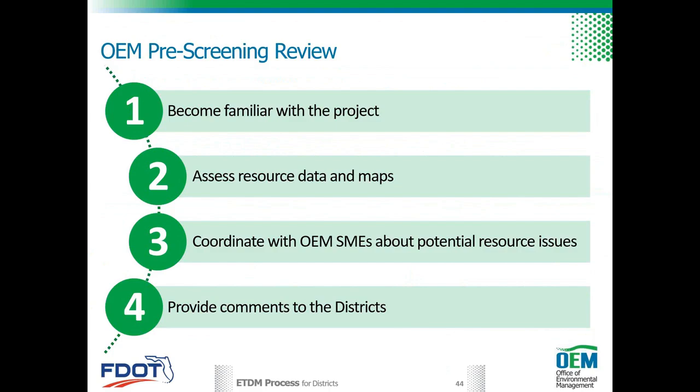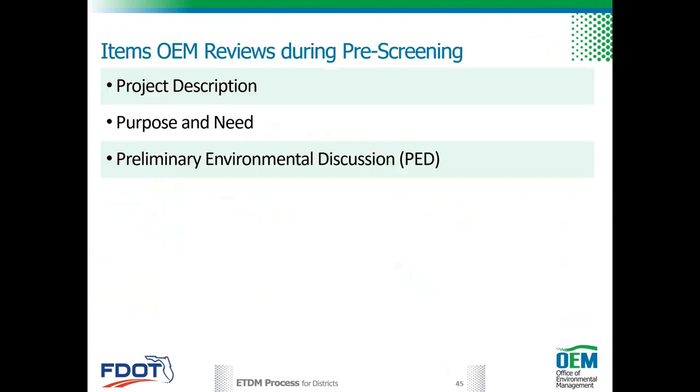OEM pre-screening review, again, they're looking to become familiar with the project, assess resource data and maps, and coordinate with OEM subject matter experts about potential resource issues, and provide comments to the districts. OEM project delivery coordinators are required to review and comment on project description, the purpose and need, and the PED.